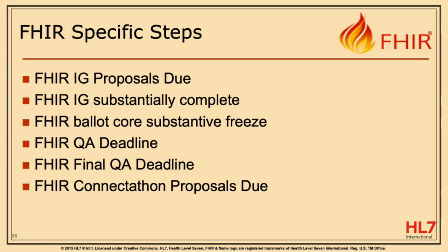So there's a huge lead time on project scope statements. For example, if you were wanting to ballot an IG in the January 2020 cycle coming up, you are too late. Your project scope statement needed to be approved by the TSC 4 weeks before now. That's if it's a new project. If it's a project you're going back to ballot with for an STU or something, you've already got a project scope statement, you're good. Yes, this is a brand new project.